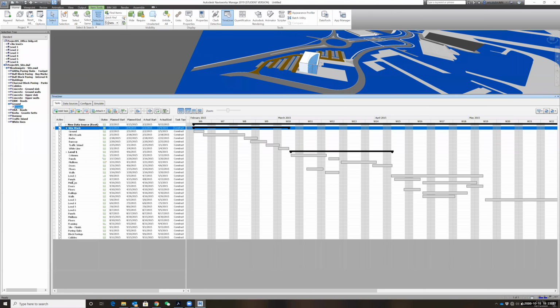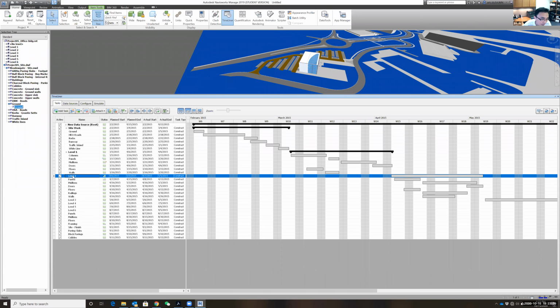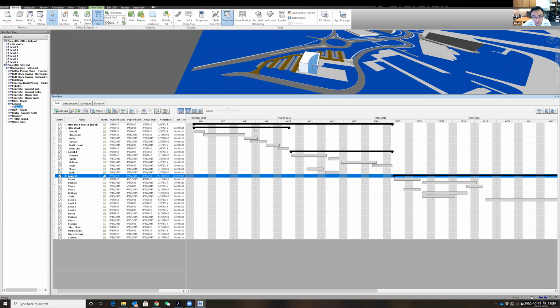Okay. So let's say, of course, you can do the outdent. Let me see. It's the same thing. So you can outdent this level 2, then make sense. So you can indent the sub activities or outdent the level 1 activity. So you see it's different. This is how we show level 1 schedule and level 2 schedule.